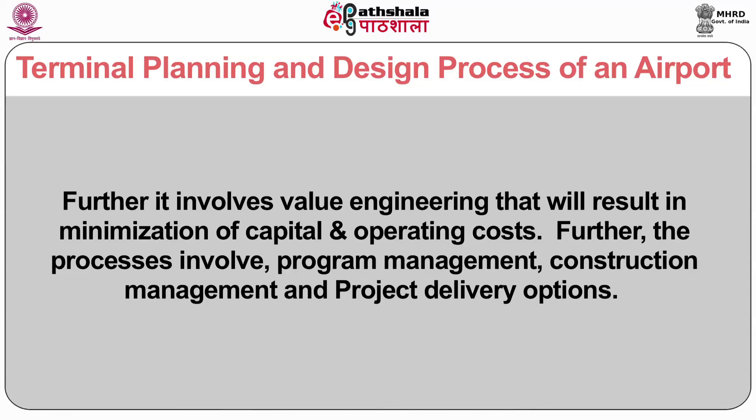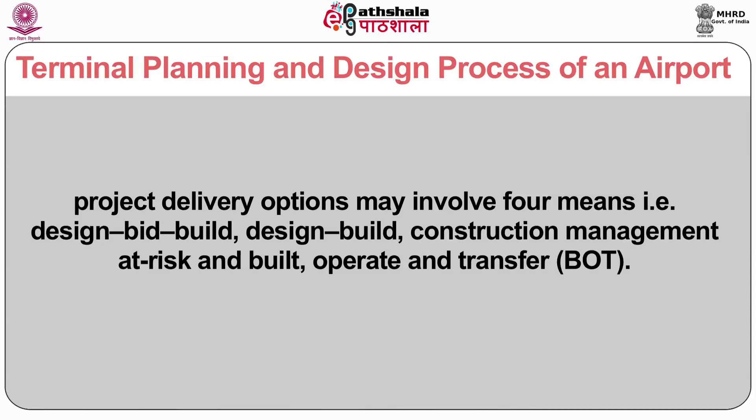The project delivery options may involve four means: design-bid-build, design-build, construction management at risk, and BOT that is build, operate and transfer. Construction regulations and building codes are principles to look after the public health and safety. Also, a certificate of occupancy gives lawful documentation that the building is safe and in a livable condition.